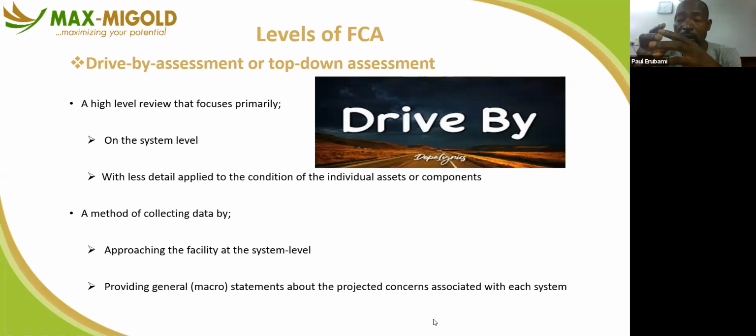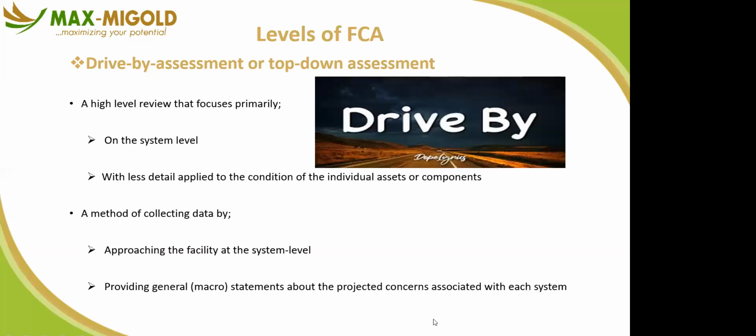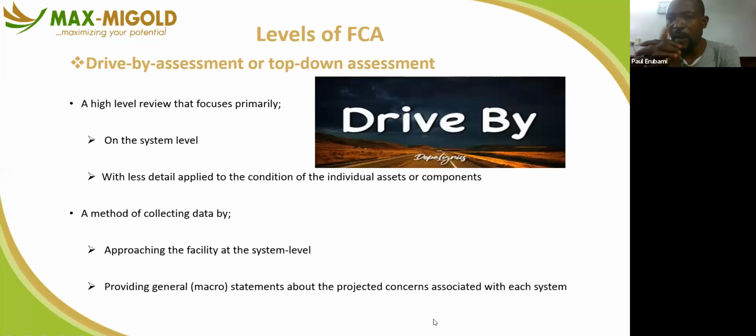If you have a pipe that you welded and you want to confirm that water passing through that pipe will not leak, you can do what we call non-destructive testing on that pipe. Plumbers do that mostly. When you first install plumbing in a new building, you inject pressure into the piping network, and when you come the following day, if there is a pressure drop, that means definitely there is a leakage somewhere within that building.